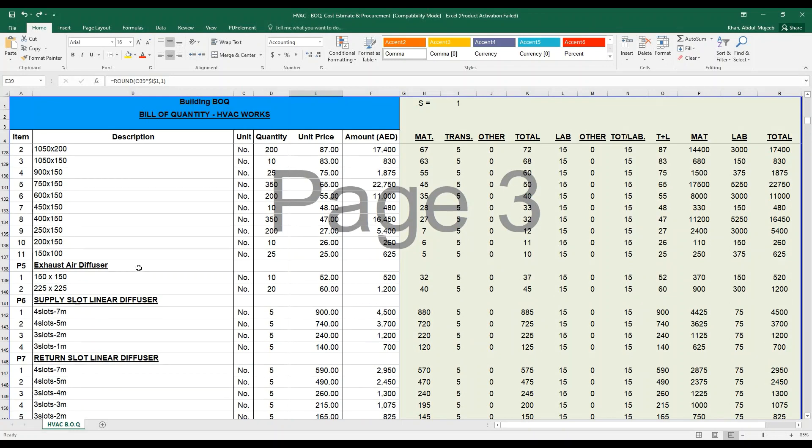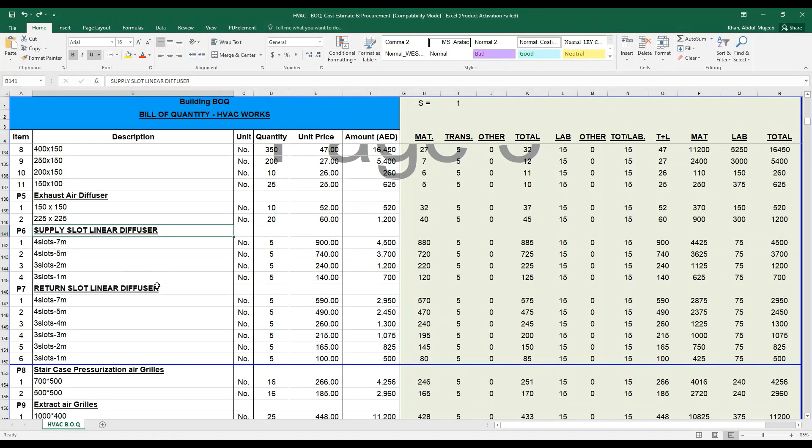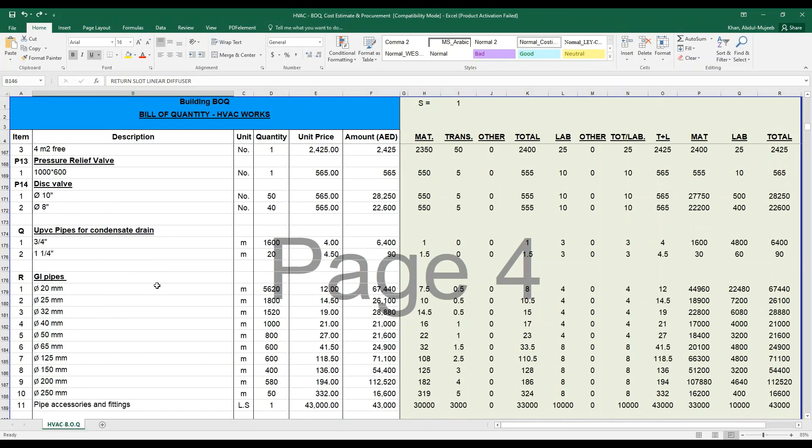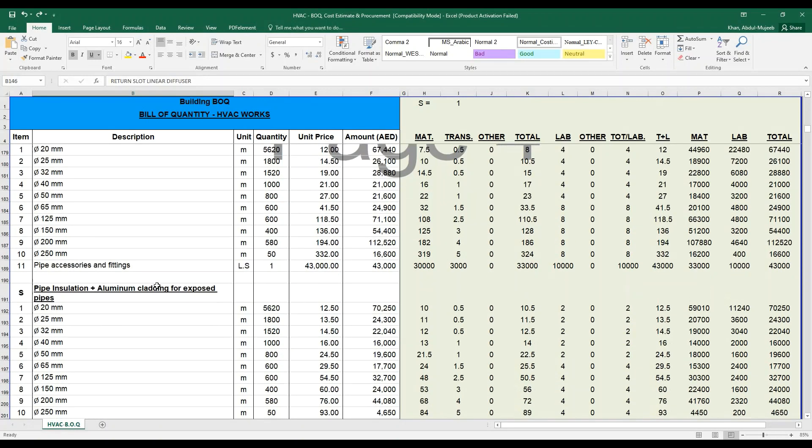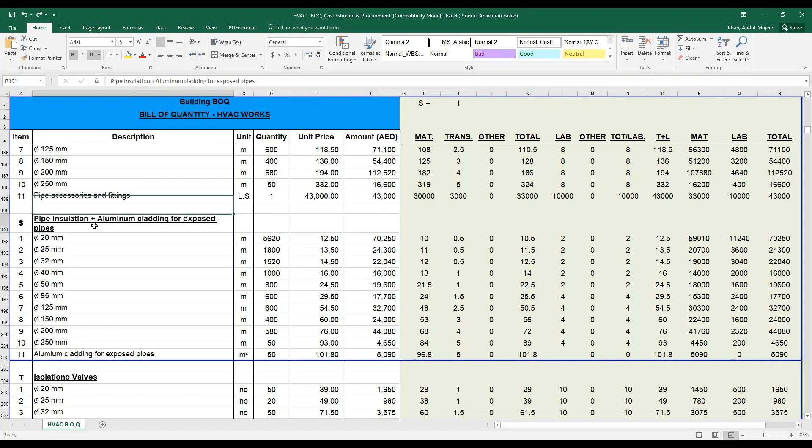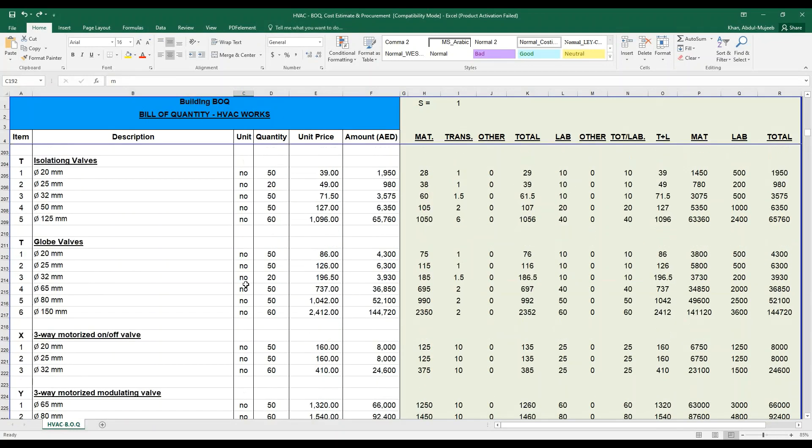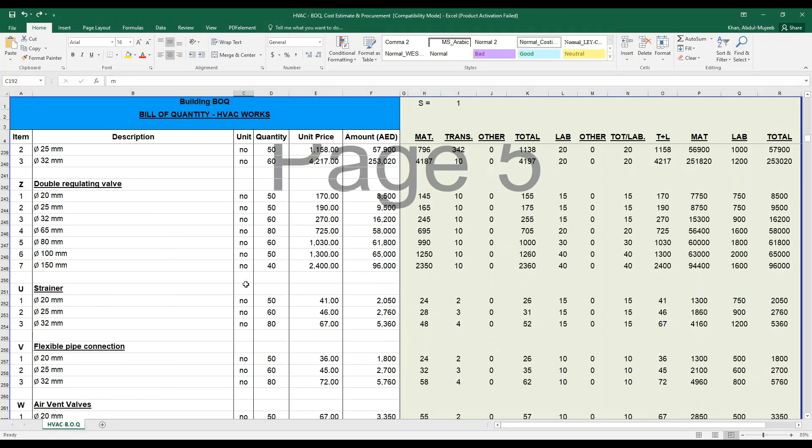These are various examples. If you can see exhaust air diffusers, supply linear slotted diffusers, return slotted diffusers. For an HVAC engineer, you have to take all these capacities from your approved shop drawing or the approved design drawing. These quantities are taken by an engineer or a designer based on your drawing. Here, the pipe insulation plus aluminum cladding for exposed pipes is measured in meters because it's a straight pipe.